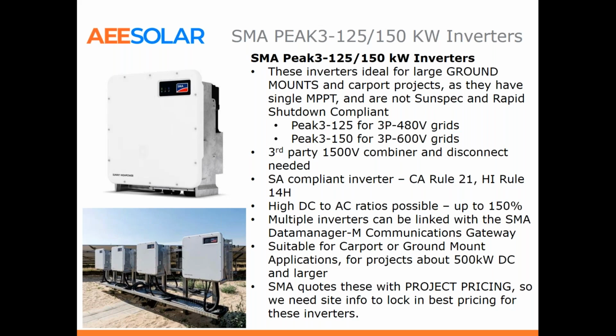And please note that these SMA inverters are not built to order, but they want to forecast on them. So to get the best pricing, we need specific site info. We need some preliminary info to get you the best pricing and request specific pricing for your project from SMA. So be prepared to answer a couple of questions about where the project is, when they expect to be purchased, and when they expect to need to be on site so that they can forecast them. If they can forecast them, then they can better meet your demands.